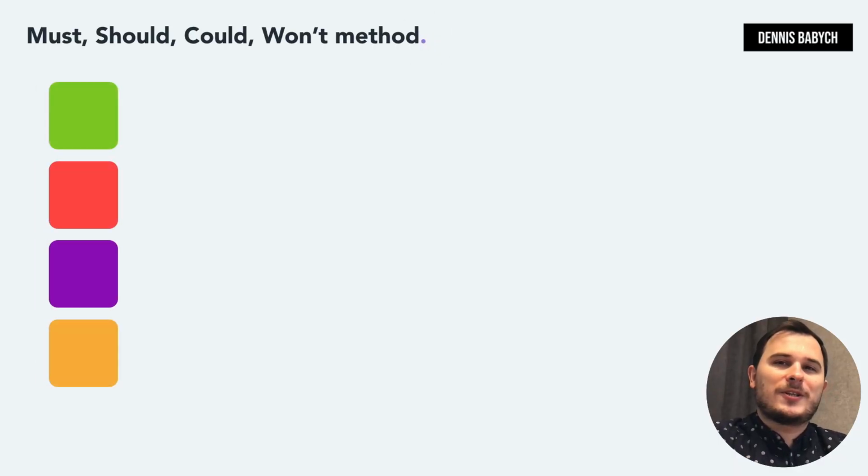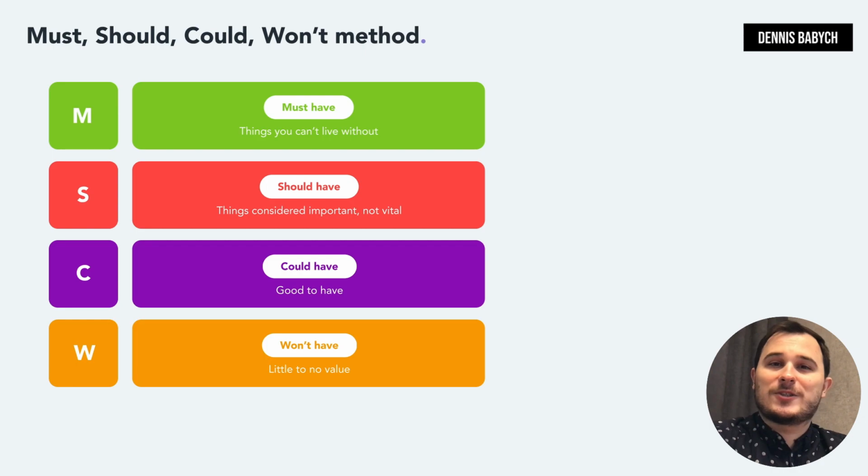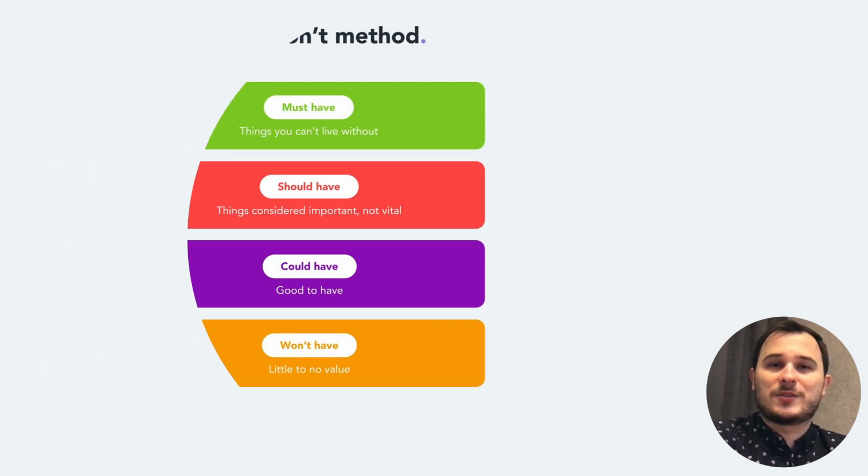Once you've thoroughly researched your competitors, identified all your customers' problems, and generated a range of solutions, it's time to properly prioritize your software features. You'll need to decide what features you must, should, could, and want to develop. This methodology effectively creates a framework of key features required for swift development and proper prioritization. On top of that, it helps you to pivot if needed with limited resources. Also, it helps you to identify your prime path and crystallize your project's fundamental goals.